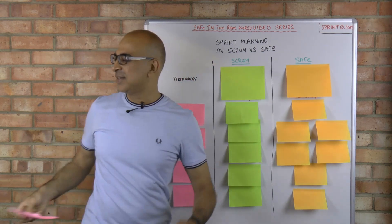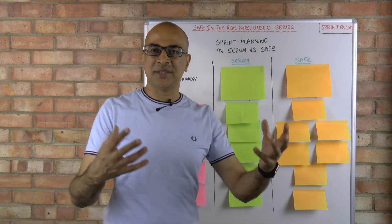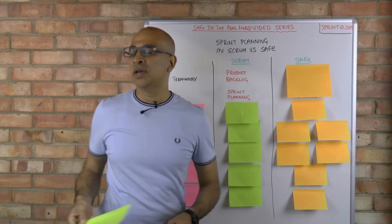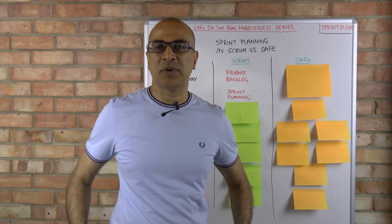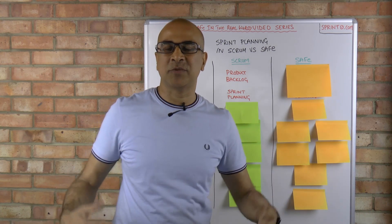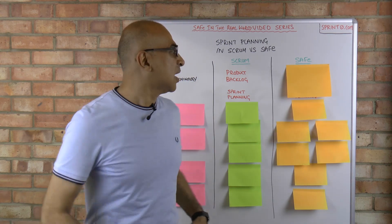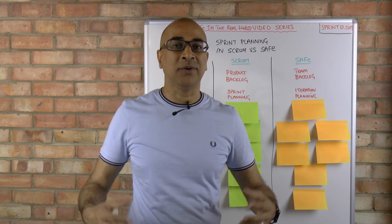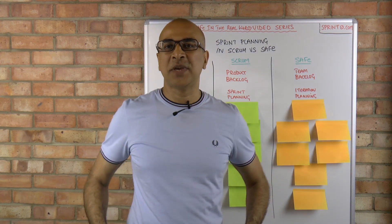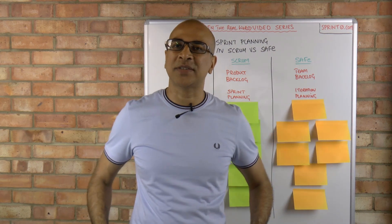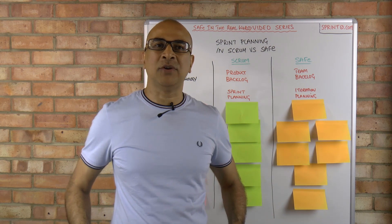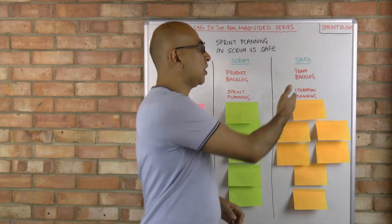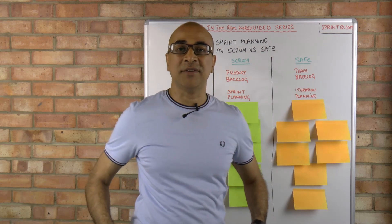Number one, as you may have guessed: terminology. There is a difference in terminology in sprint planning in Scrum versus SAFe. Scrum uses the term 'product backlog' and 'sprint planning', because you're expected to have a single product that the team is working on. In SAFe, we have multiple tiers of backlogs — a portfolio backlog, a program backlog, and a team-level backlog — so it's referred to as the 'team backlog'. And to keep it framework agnostic, it's referred to as 'iteration planning' rather than sprint planning in SAFe.